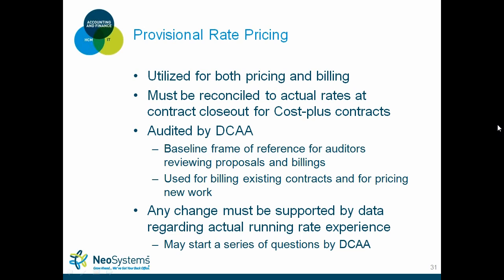And in most cases, it lowers your wrap rate when you develop a provisional rate. So if you're typically at 1.8 every year, and let's say you want to go ahead and forecast out these rates this year, you might be at 1.67, 1.7, but the beauty of that is that, okay, you're giving the government forecasted rates, but at the same time, you have more of an advantage of winning that work. So the lower rates that you have, the more chances you have of winning that work. Anytime you win work, it decreases your indirect rates. So that's pretty much how that works out, okay?